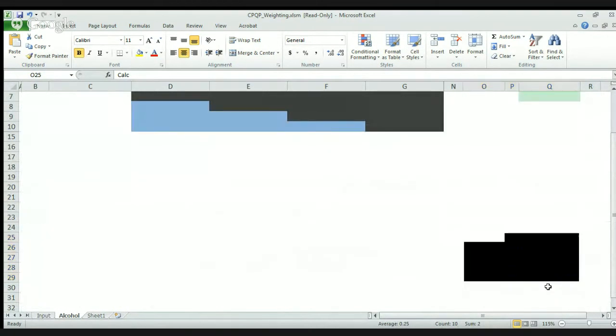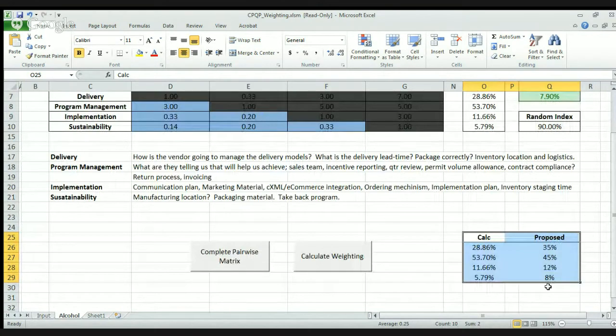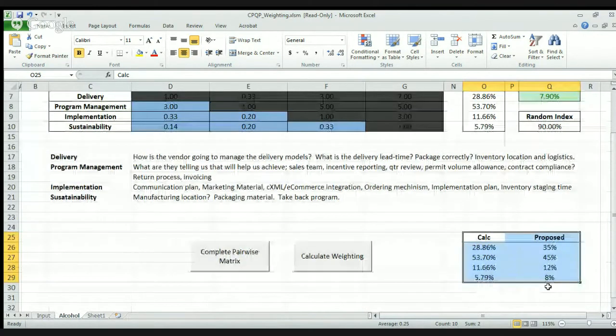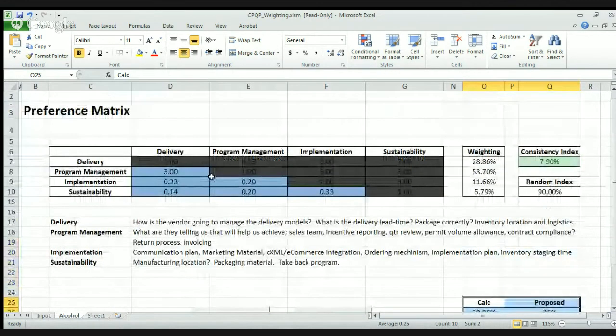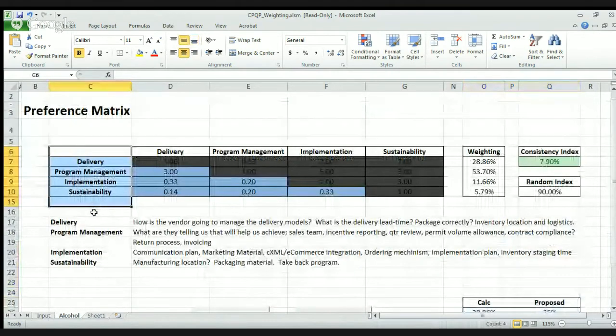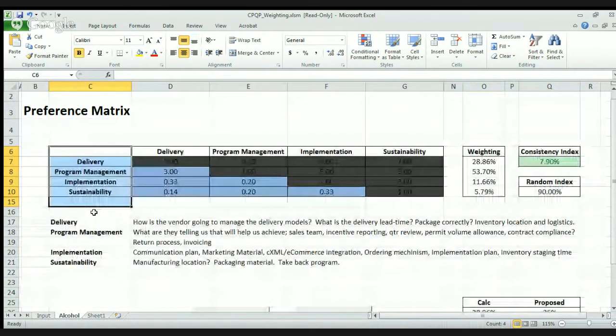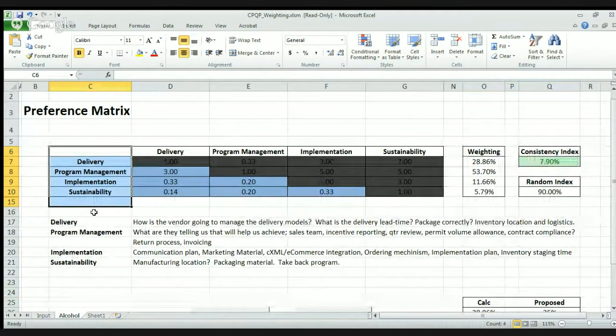And then what do you mean you use those values in the bid? So you've got this weighting, I guess, of the importance of these needs. What do you do with that piece next? Okay, so what we ended up doing was writing questions that we thought would address these dimensions, and then used the proposed scores that we came up with as the weighting to determine the value of the respondent's answer.